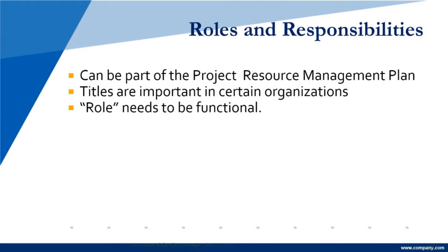Role needs to be functional. If I note a role in a document for a project, I want to make it very functional. If I need a developer, it's not "I need a developer." It's "I need a C++ developer who can do web development on a Android device in an agile environment."